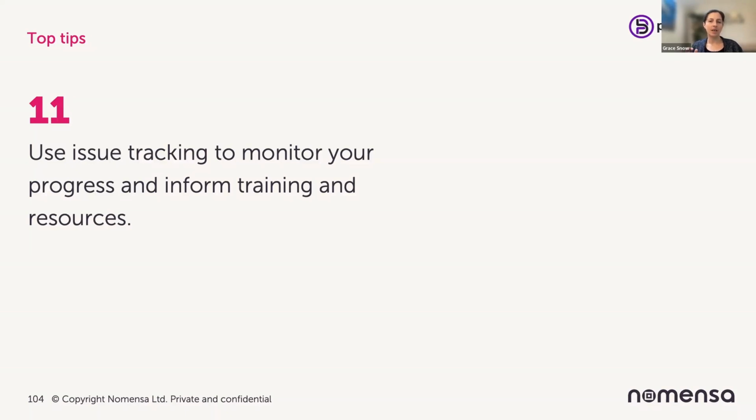We always used A11Y, accessibility, a little short code. We used it in the title, and then we pulled things out into a dashboard in Jira, so the developers could see where things were, the testers could see where things were, and everything stayed linked up with our separate spreadsheet with our backlog of issues.